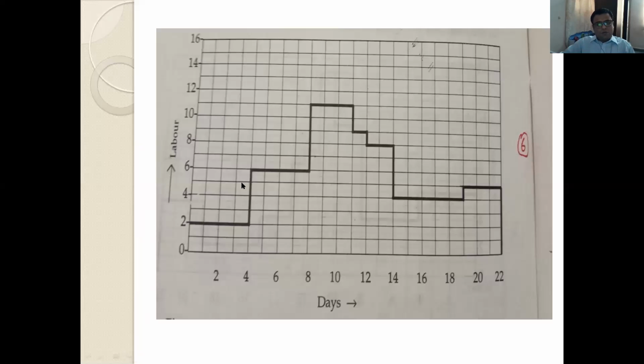When we find out the new cumulative resource requirement, from that we plot this histogram. Now see here, the resource requirement is lower than 15. It was up to 15, and now it comes down to 11. But our target is to lower it below 7, because the constraint is that the number of labor or resources available is only 7. Again, we have to do resource smoothing.